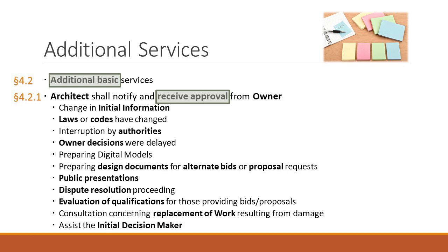Architect's additional services, as I said, is any additional services provided in accordance with this section, and you get paid for that, pursuant to 11.3, that's your compensation section of this agreement. So an additional service, as I said, is more of the basic, but you're doing in addition to it. And it could be more sophisticated. It could be, I'm doing electrical. We thought we were going to do straight electrical, but now I need to do high voltage electrical. That's still electrical. It's in addition to what the basic services are. I get paid for it, so I'm going to perform it. Okay?